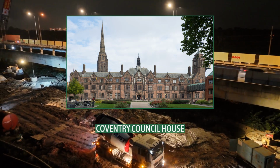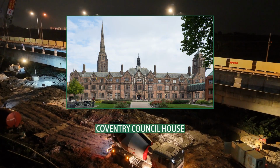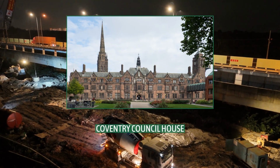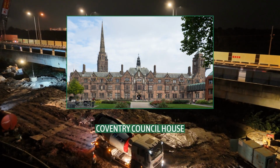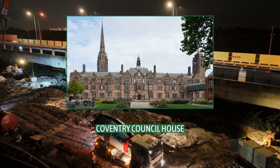The MOT approved Stage 1 in December 1957, pledging 75% of the estimated £310,000 cost for the stage. The MOT justified the grant, which was higher than was normal for the central government at the time, by citing Coventry's status as a blitz city.